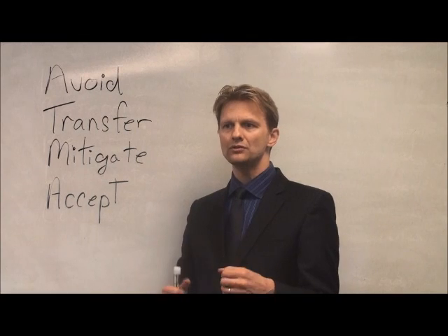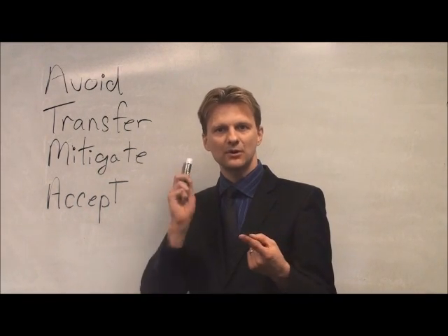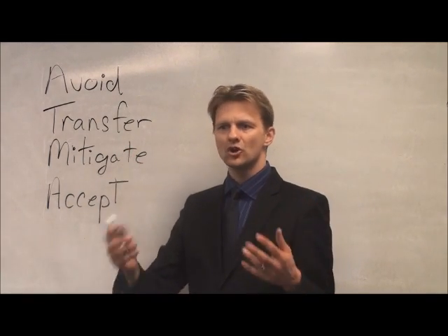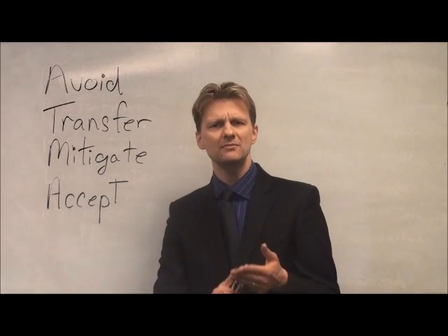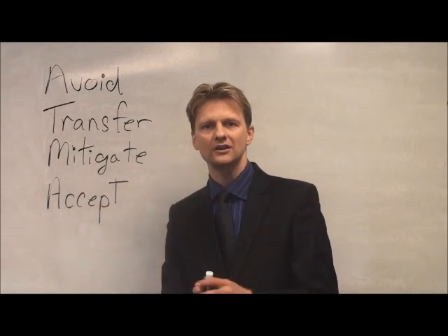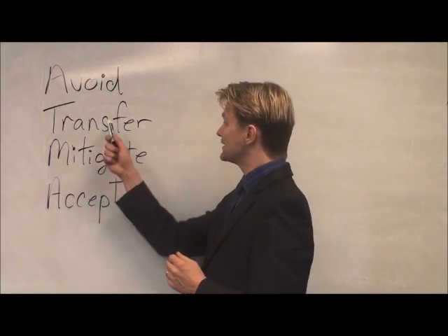What can we do to change something drastically in the project? So it's about changing it so the risk is actually eliminated. Change the scope, change the person doing the work, change the material, or change the equipment. Put up some kind of guard on the equipment. And the risk is avoided.